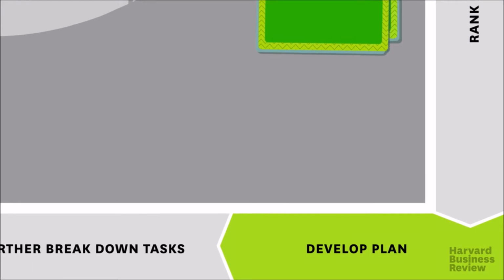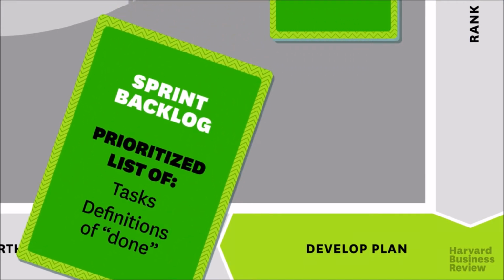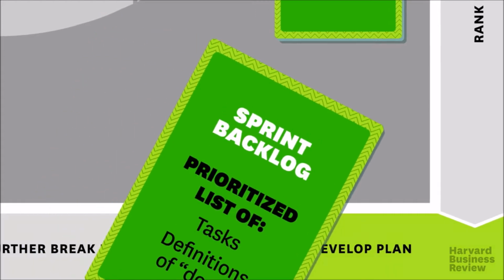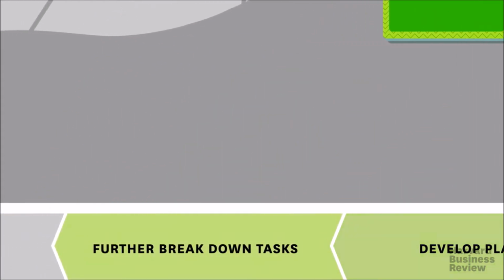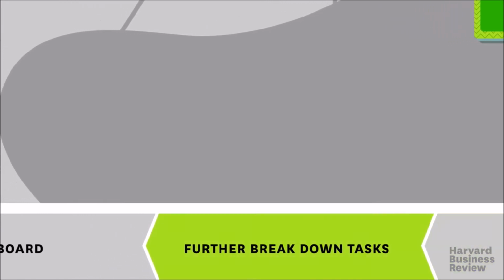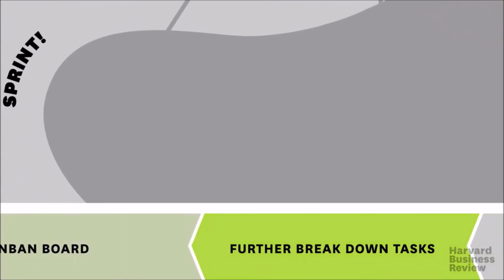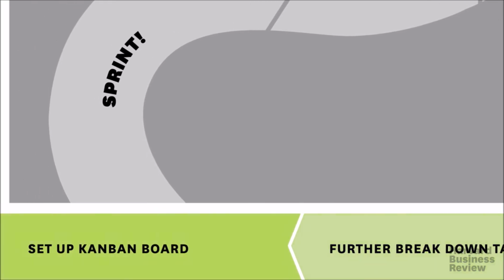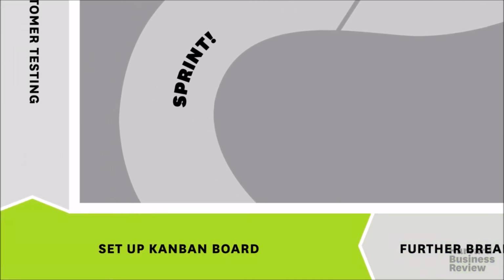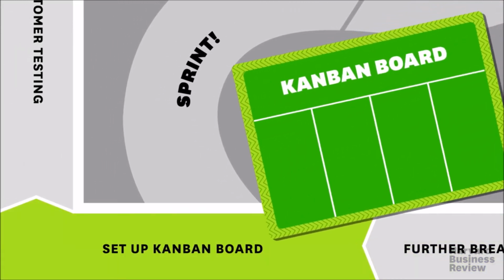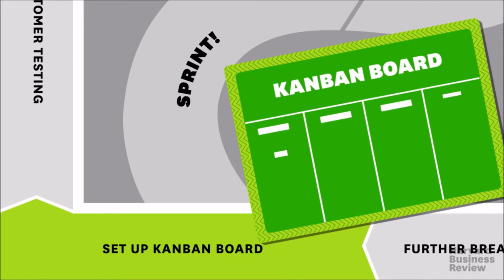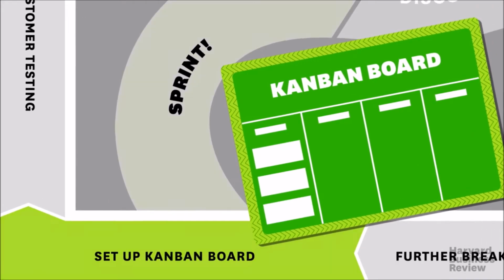At the outset of each sprint, the team members establish a goal, check to make certain that they have all the talent and resources they need to reach it, make sure each task is ready to begin, define how they will know when it's done, and develop a methodology for testing the results. Each sprint gets broken up into individual tasks and activities which are tracked using a Kanban board or computerized workflow system. And throughout the sprint, the entire team focuses on the same or similar tasks.